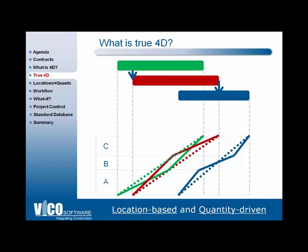This results as we can see in a clash. It's similar to the 3D clash detection that we run through our building information models. This is actually showing us where trades might clash on sites. So these red dots indicate where we could have problems with these trades clashing on the site. This is only seen by us including this more location-based and granular level of quantity-driven data and basing it on real resources and real productivity rates.